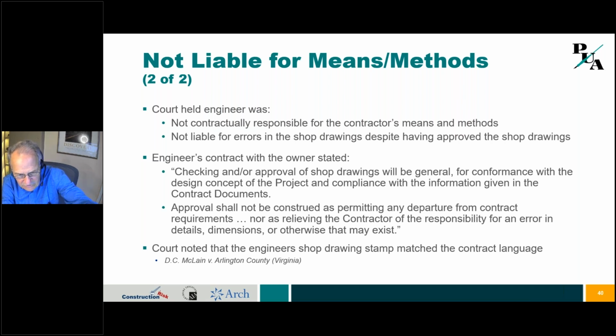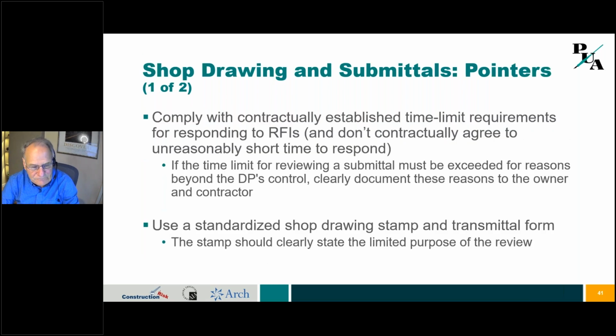And the court said, well, in this case, the engineer's shop drawing stamp that he put on the drawing and the contract language matched. It wasn't different. It was exactly the same wording. Contractor had no way of making a claim against this engineer. So I find that's very important, to have that good language on your stamp, have that good language in your contract. All right, next.